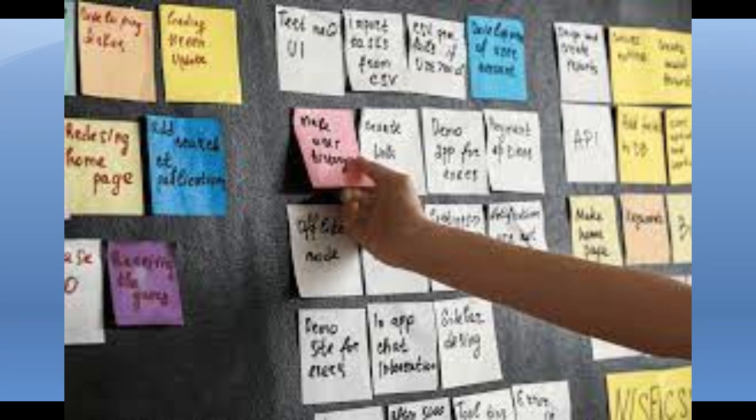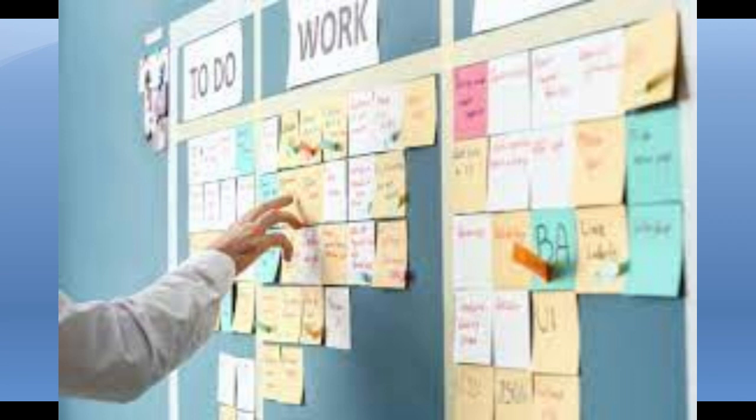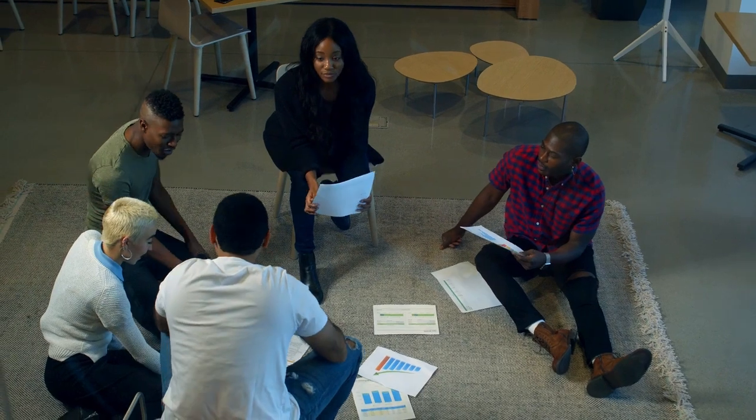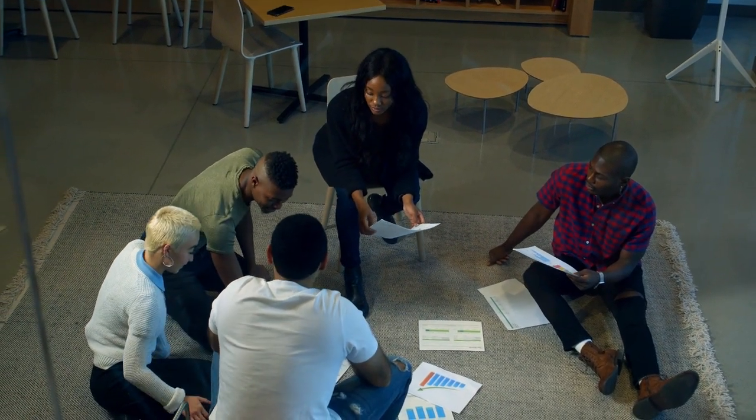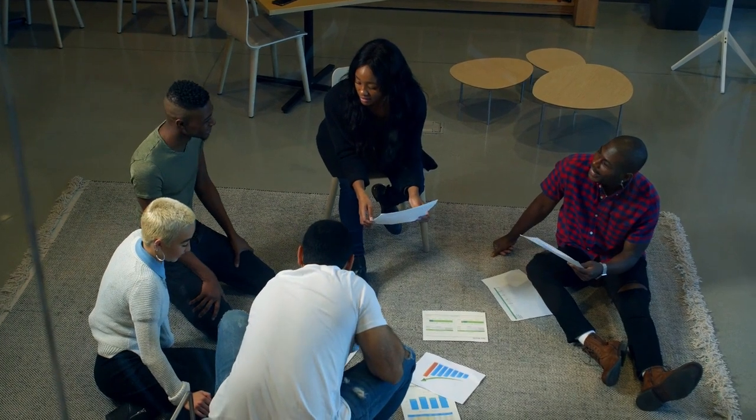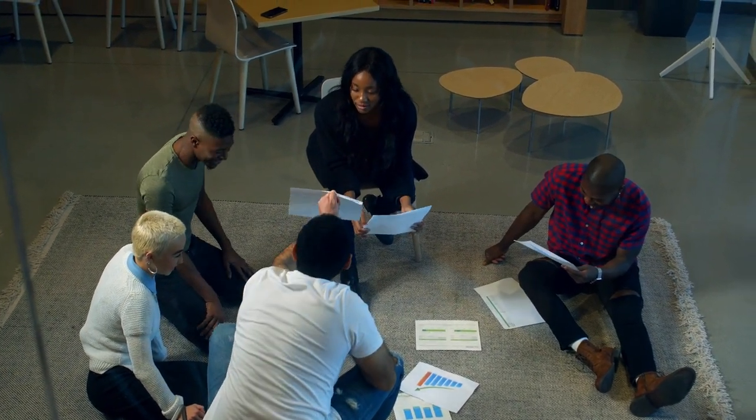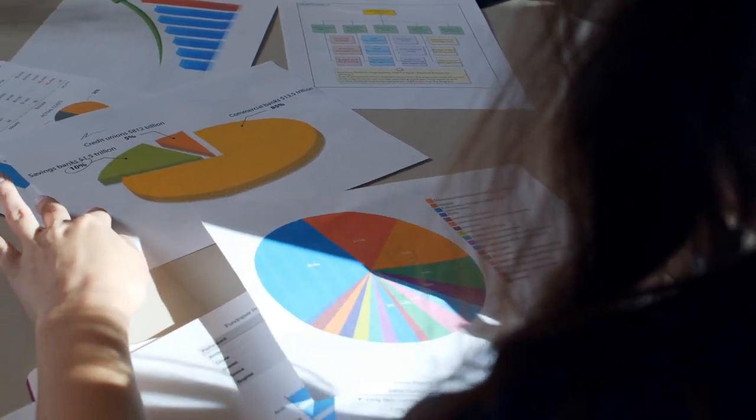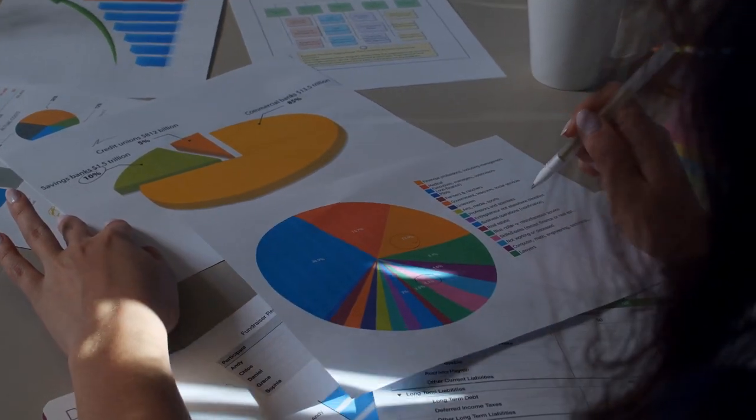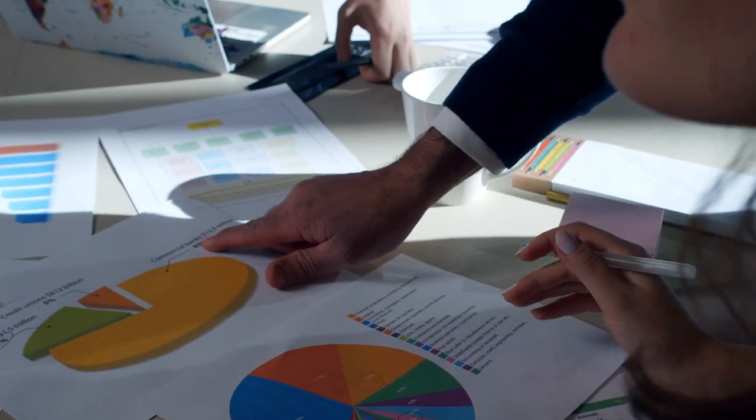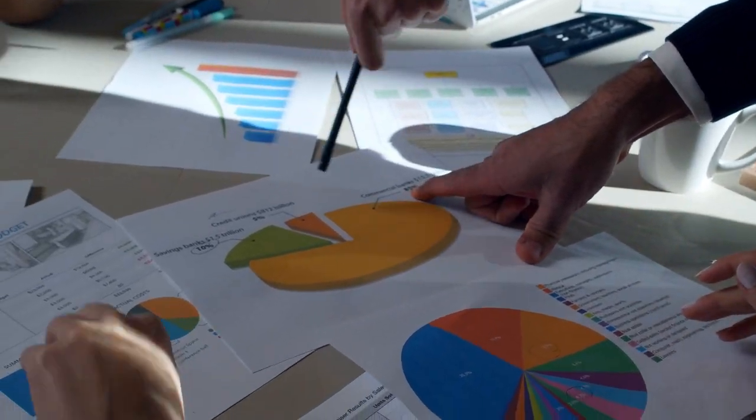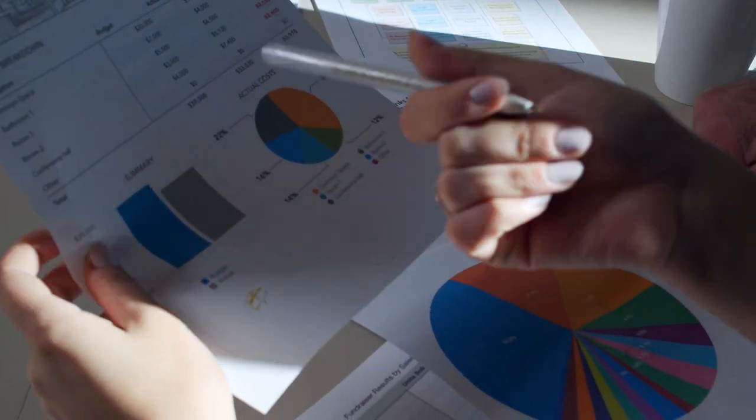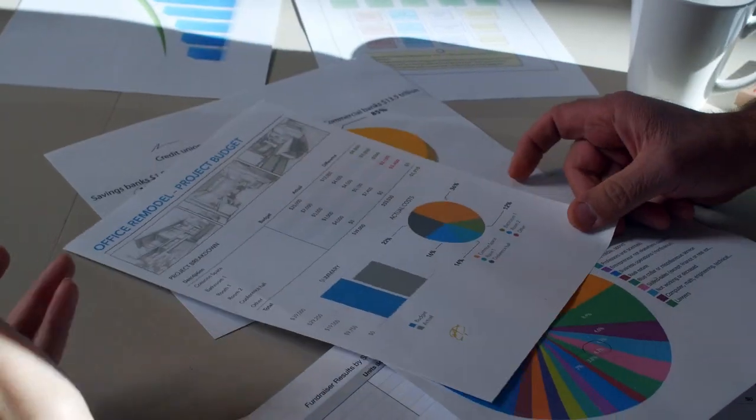So let's start friend. First of all, we have to understand what is actually overcommitment. Overcommitment means that, for example, you are working for a project and you know that in one month, for example four weeks, you can complete 10 tasks. And you just take it over-ambitious, or you can say you take it as a challenge that you will complete 25 tasks in one month. You know that the team is capable only to deliver 10 tasks and you have committed that you will complete 25 tasks. Due to that reason, there may be so many issues that occur in the delivery, in the confidence of the team, and it will increase the level of frustration, turnover, and dissatisfaction within the team. So basically this is the concept of overcommitment.